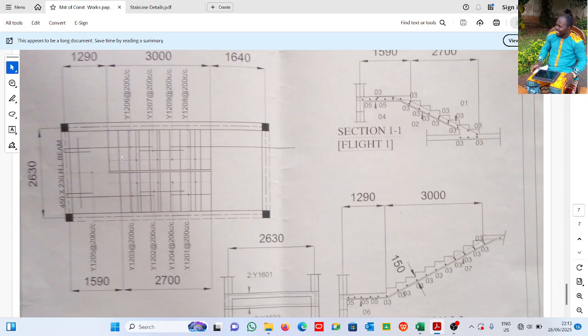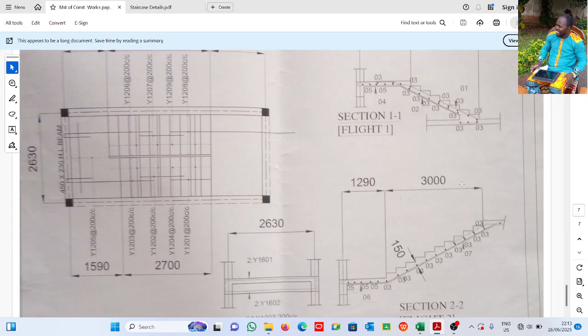This is where the dimension line has covered both this riser, so I have to deduct it. I need to know the length of the riser; the width is already known. It is shown here. This is 3000, meaning each of them is 300 times 10. 1 2 3 4 5 6 7 8 9 10. So we'll get to that.